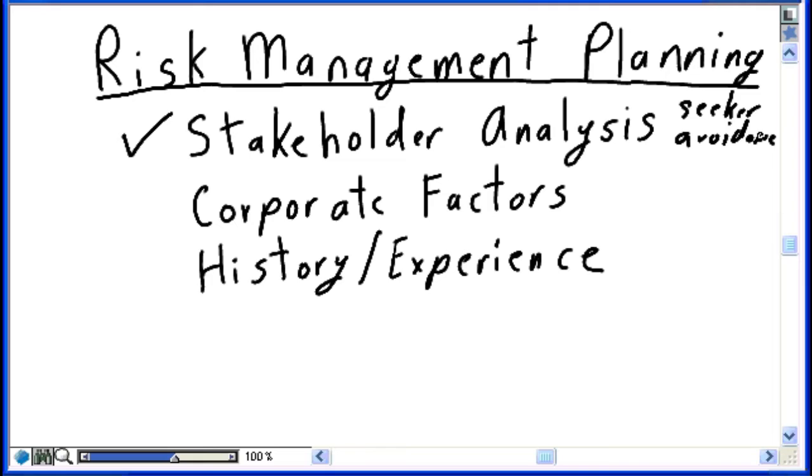If the project is initiated to develop a new product, or the project is initiated to develop a breakthrough approach, allowing the organization to deliver a new product, new service, to differentiate their product or service, that project should be a risk-seeking project. That project should be willing to take risks to develop that breakthrough strategy. At the end of the project, if the risks are too much and the project fails, it was a learning experience. The business still continues with the status quo, and they will simply start a new project with a new set of risks, with a new strategy to develop the next breakthrough strategy.